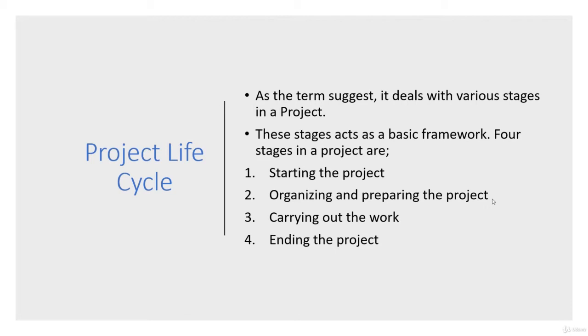Then they will move to cycle 2, which is organizing and preparing the project. So at this stage, there is a documentation, there is approval for the project. In cycle 1, they could have also done a high level estimation based upon their initial understanding of the change, because they needed something as ballpark, as placeholder. So let's say they got a funding approved for 100,000 USD, US dollar. Now they have an understanding, there's a tolerance that it could go up and down by 10%.